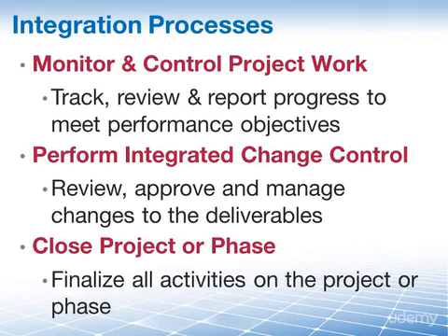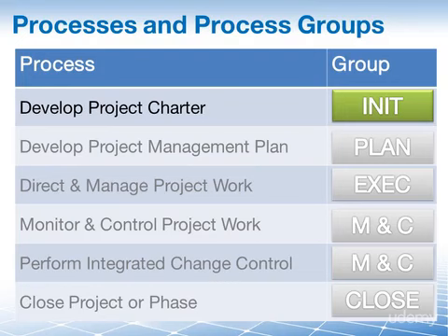That's the process of finalizing all activities across all of the project management process groups to formally complete a project or phase. As a reminder, Project Integration Management is the only knowledge area that has a process in every single one of our 5 process groups.